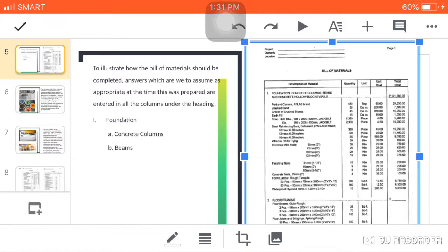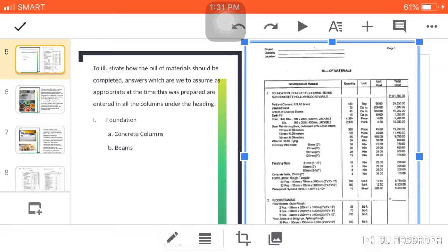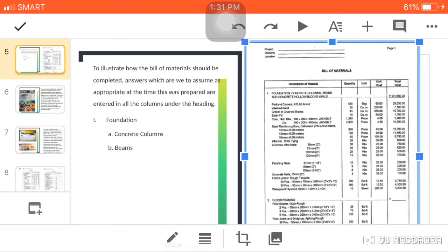For the third column, the unit. For the cement, it is in bags. For the sand, gravel, earth fill, it is in cubic meters or volume. For the concrete hollow blocks, it is in pieces. For the steel reinforcing bars, it is in kilograms. For the wood, it is in board feet, and so on and so forth. It depends on the materials.